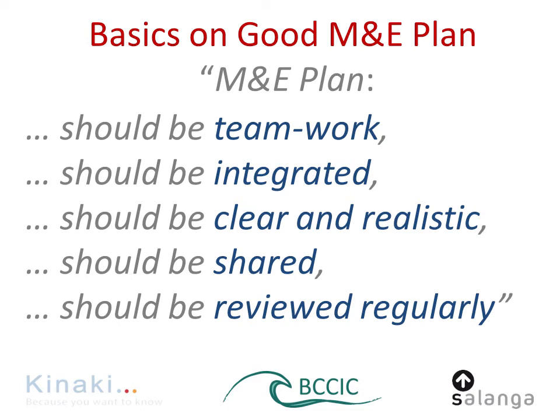Try to integrate the M&E plan as much as possible in the activity and implementation planning. Because if you are implementing an activity and you already know how you are going to monitor its implementation, it will significantly speed up the whole work. But also try to integrate higher level outcomes in the measurements. Let's say household surveys can be done really nicely together with some other implementation when you invite, for example, people for a training to one location.